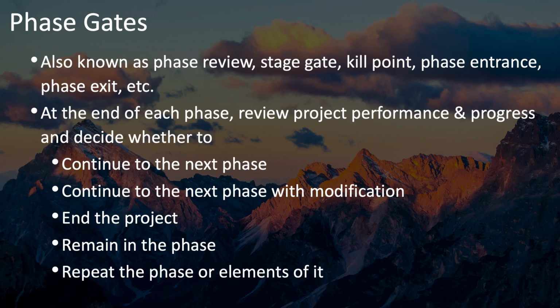Or you may decide that the phase needs some rework and that you need a little bit more time, and so you decide to remain in that phase and continue work until later, and when that is done, you'll come back to this phase gate again and make a decision. Or you may decide that a lot has gone wrong with the phase or something's changed and you need to start over and repeat this phase again.